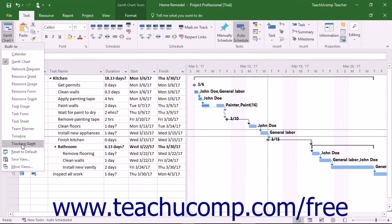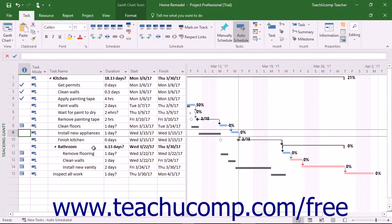Then select the Tracking Gantt choice from the dropdown menu that appears. In the Tracking Gantt view, Microsoft Project shows critical task bars in red and non-critical task bars in blue within the bar chart area. For non-critical tasks, the thin teal line represents the slack time associated with the task.